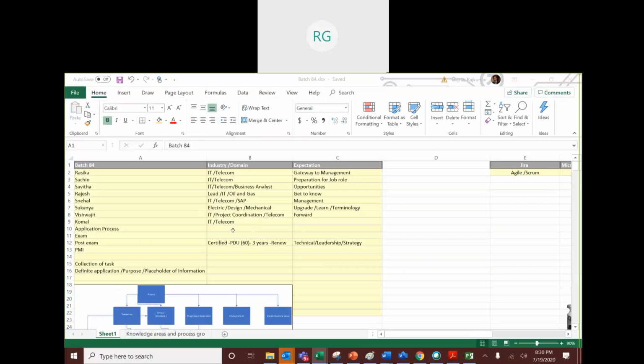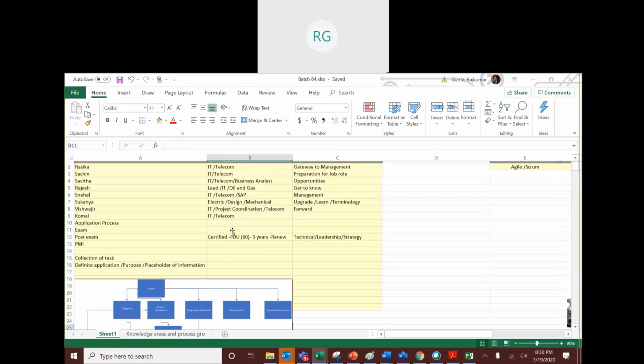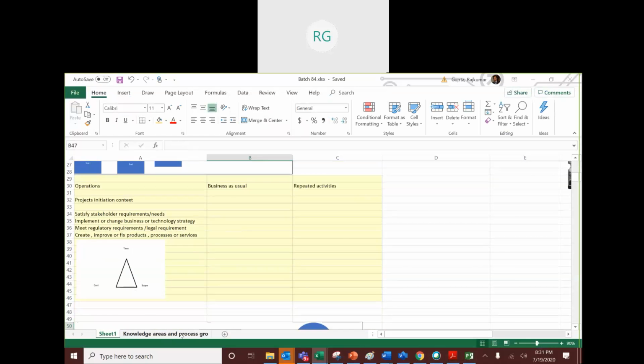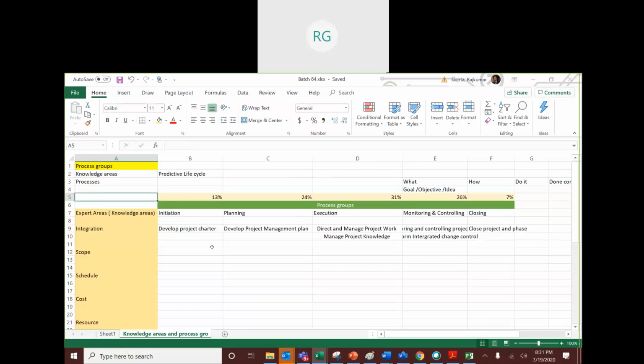Before we move any further, and that is what this book also says, there are a few things you need to do before the project, which is a business case document and benefit realization. After you have everything understood, you start with the charter. What is a charter? It is a very high level project plan. Who makes this charter? In general, the project manager is not even there before the charter gets started. It is only the sponsor, or somebody who recommends it as a good thing, who needs to be there. Once the sponsor signs on this project charter, it becomes a real live project.